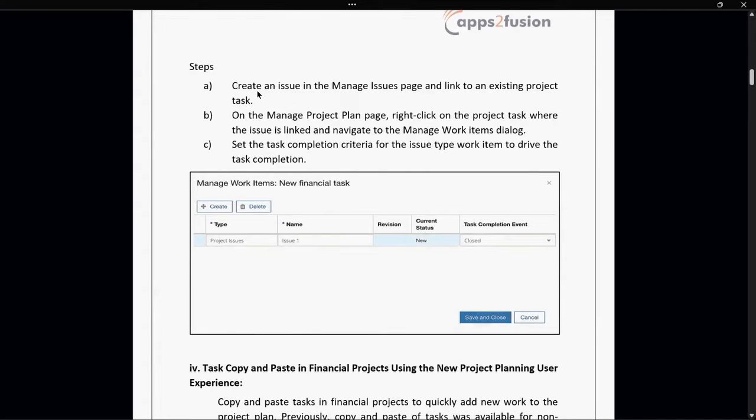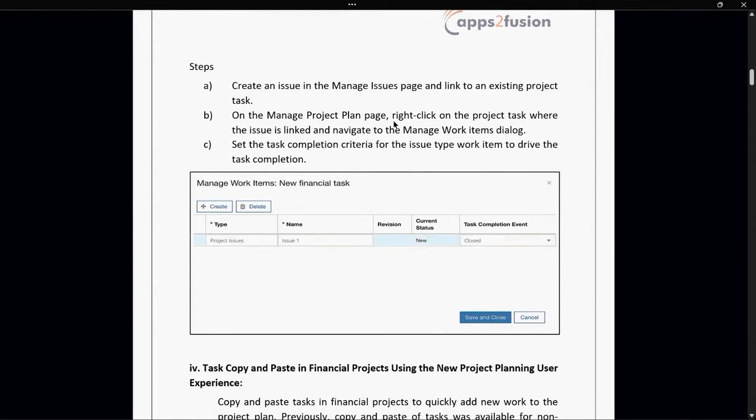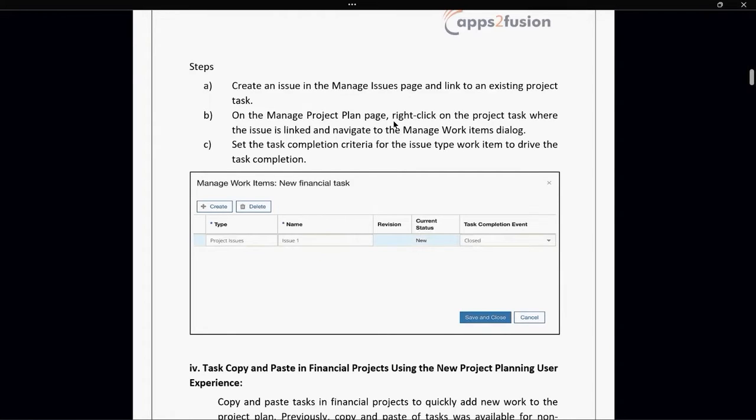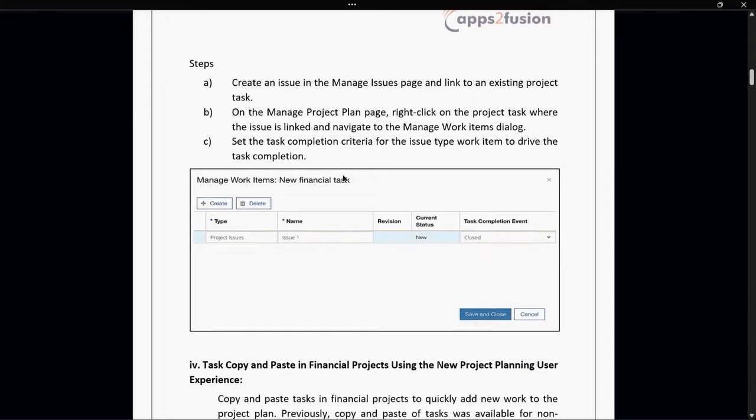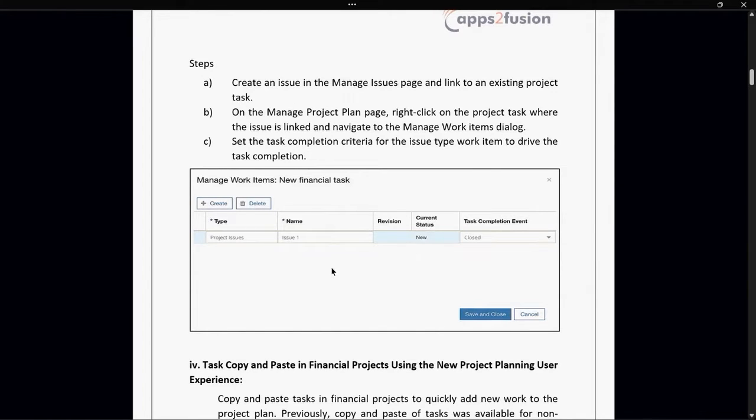Project manager and team members can create issues for task milestones and automatically list them as work items for driving task progress. One can set task completion criteria for each work item to mark the task complete when all associated work items meet the criteria. First, we have to create an issue on the manage issue page and link the existing project task. Let me show you how it looks like.